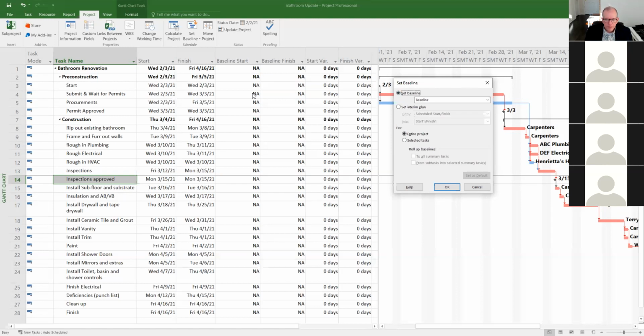You'll go through all the updates, and then you'll go to check the variance, and you'll say, I got no variance. Why do I have no variance? And I'll tell you why. You never set the baseline. So it can't measure the difference if you didn't tell it what the benchmark was that it's measuring against.